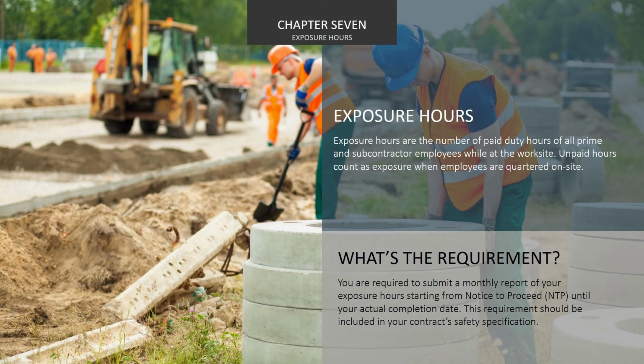Moving on to exposure hours. The exposure hours are the number of paid duty hours of all prime and subcontractor employees' time while on the project site. Unpaid hours count as exposure when employees are housed on site. The contractor is required to submit a monthly report of your exposure hours, starting from notice to proceed until the actual completion date. This requirement should be included in your contract safety specification.